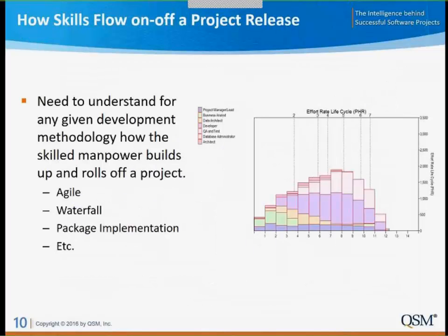Final thing that we want to do is get a feel for how the skills, and this really plays more to our resource management aspect of the portfolio planning, but how the skills are going to roll on and roll off a project as a function of time. And so we may have several different methodologies that might have different skill sets. We might actually have to build out a couple of different profiles or templates that will represent those. But there's some logical way in which people skills are going to build up and ramp off of a project.